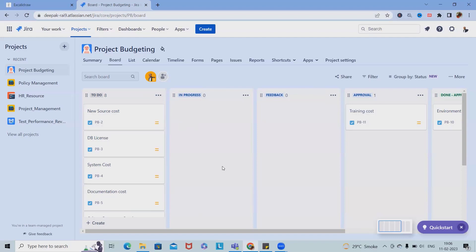This is always suggested to add 10 to 20% on the higher side of the budget so that once the approval is received, we can adjust to other things. Because when the project is for a longer duration, we cannot directly stick with any particular thing. We might get some surprises or might get some additional costs to be added within that project.